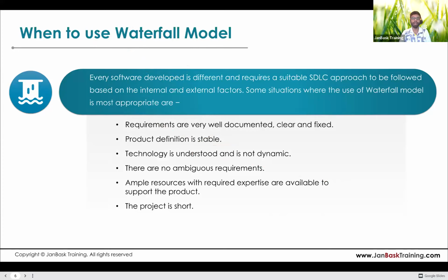And that helps you. If your requirement is fixed, then it helps the developers to fix their design, and it helps the testers as well to develop their test planning and test cases. So everything goes smoothly in that case. If the requirements are documented, clear, fixed, and stable, then you can go ahead with the waterfall model.